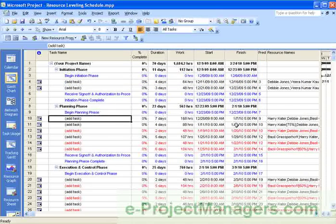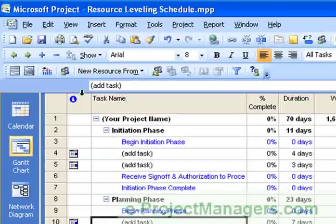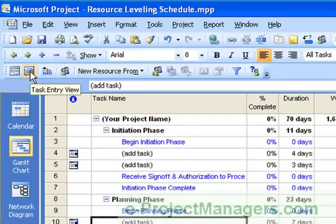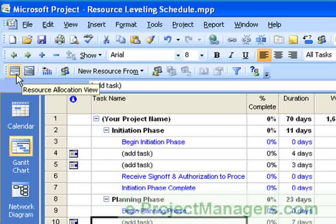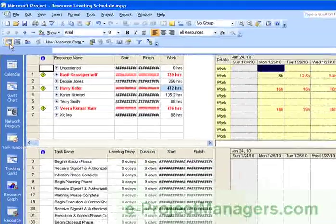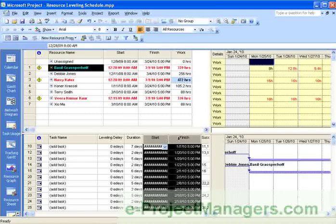Now, in this schedule, I've actually already inserted a number of resources. I also show you how to use the views in the Resource Management Toolbar so that once you've added your resources, you can quickly view who is over-allocated, as you see here in this example.